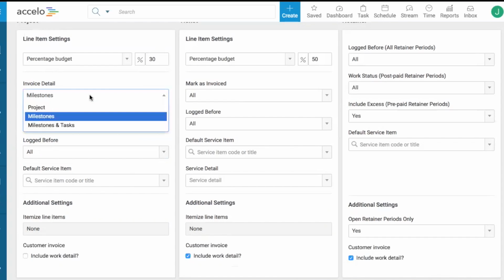And most of the times we're finding on fixed price, or especially that down deposit, that will show the milestones that are involved and how much. But let's say that it was a very small, like a server upgrade or maybe a little WordPress site. What I would do is probably just show project as a line item. And then on some of those more complicated, bigger projects, we're finding customers showing everything, all the milestones and tasks. This just gives you flexibility on making sure that I'm not having to make this decision every single time. It's just easy. I drop in this template and invoice for the work, especially for that smaller work.